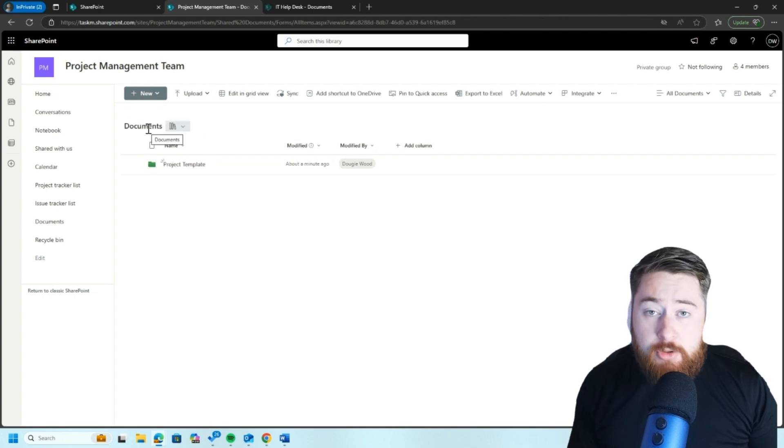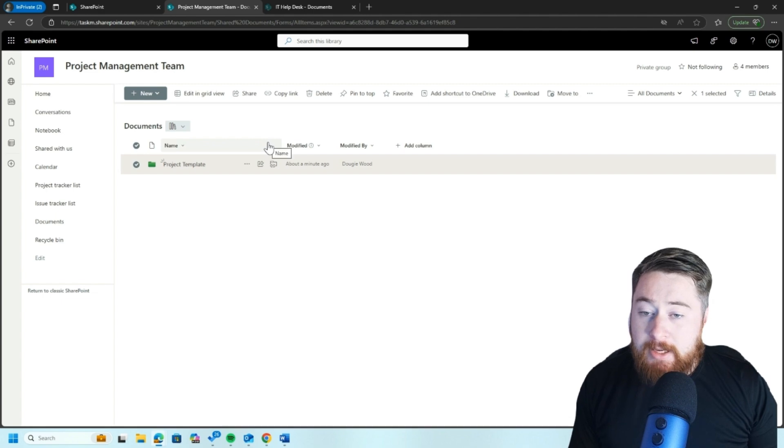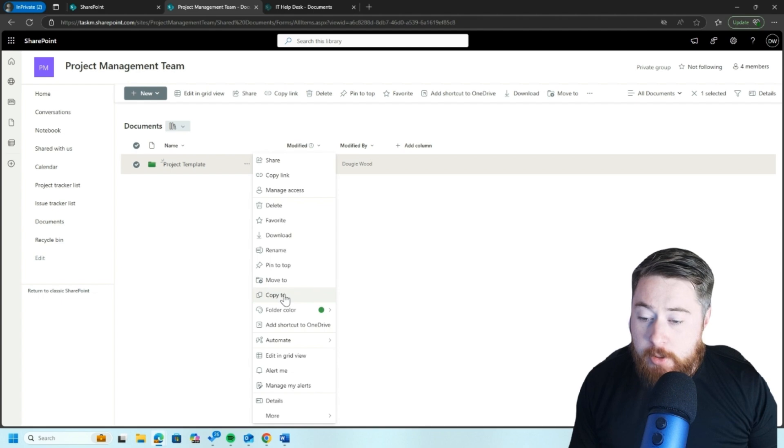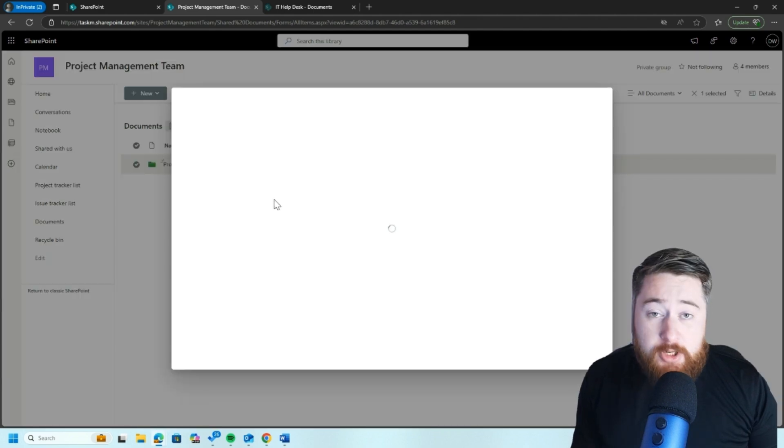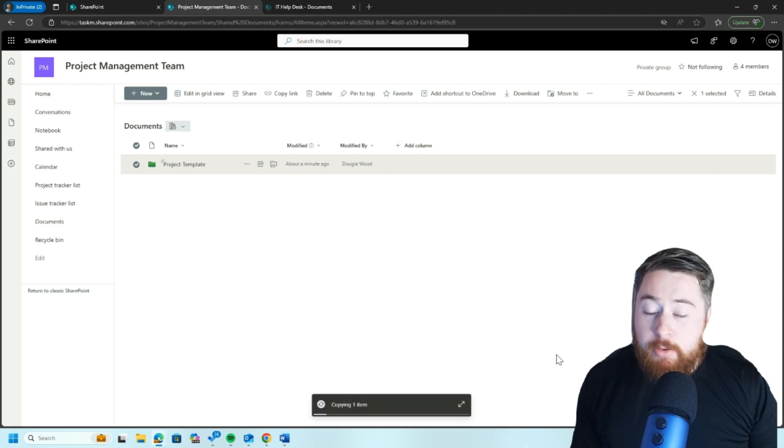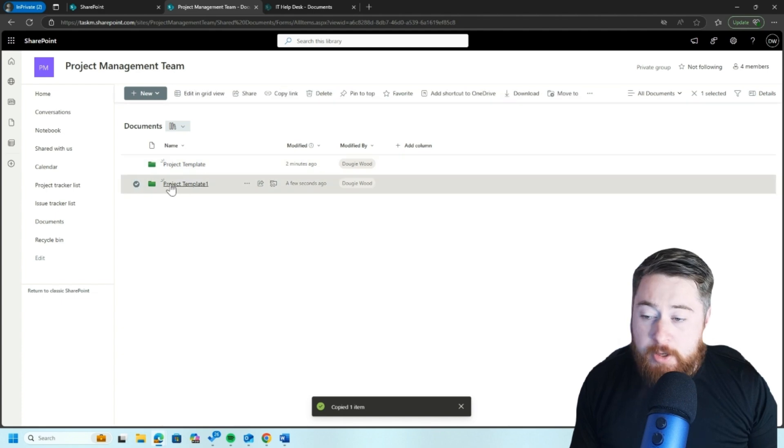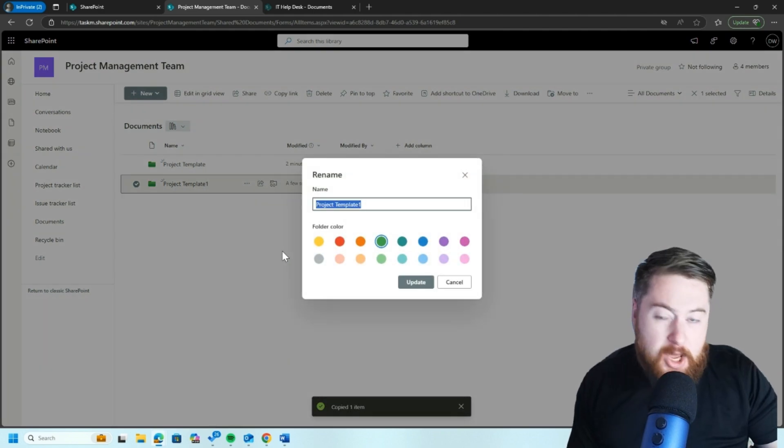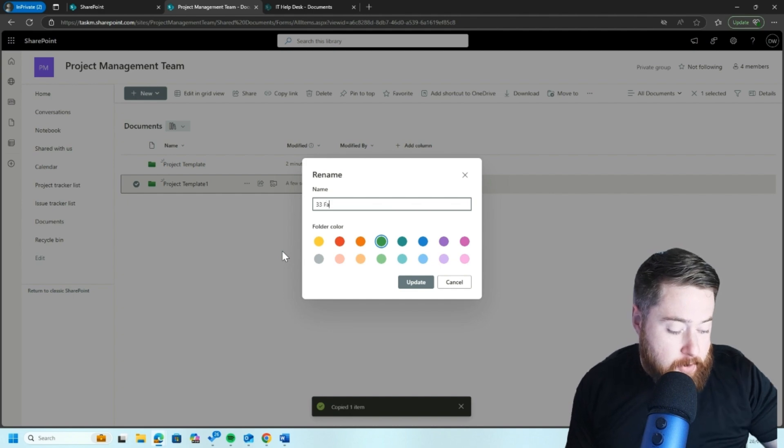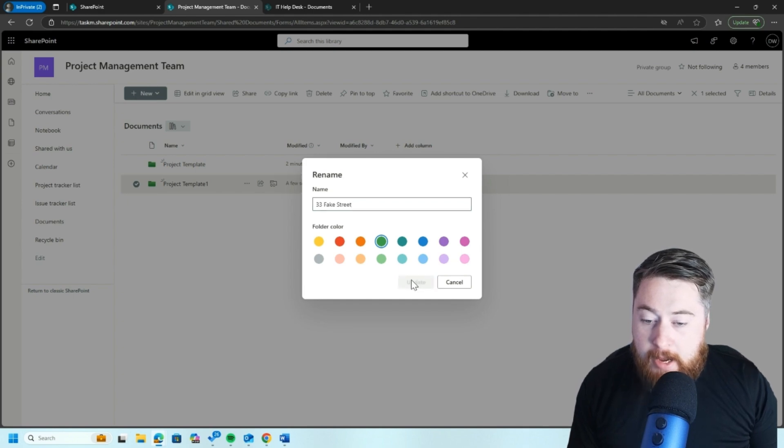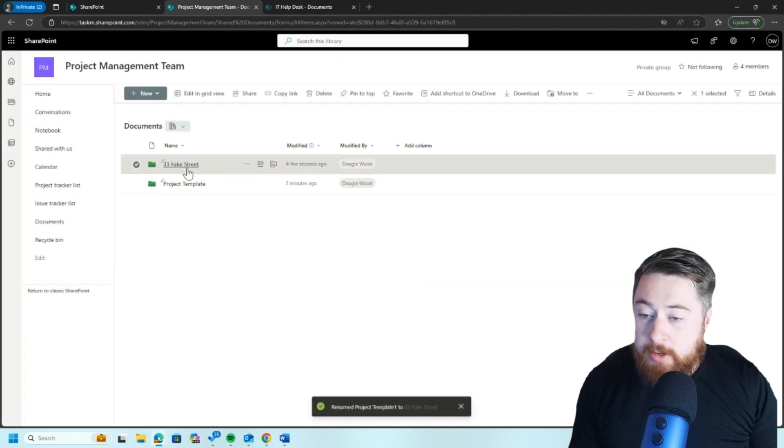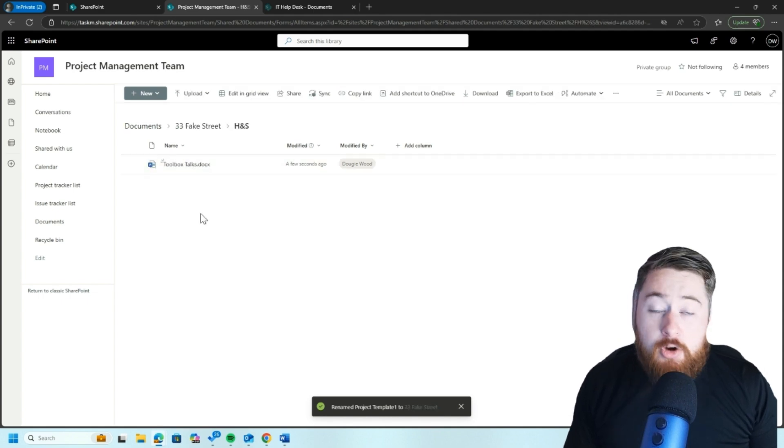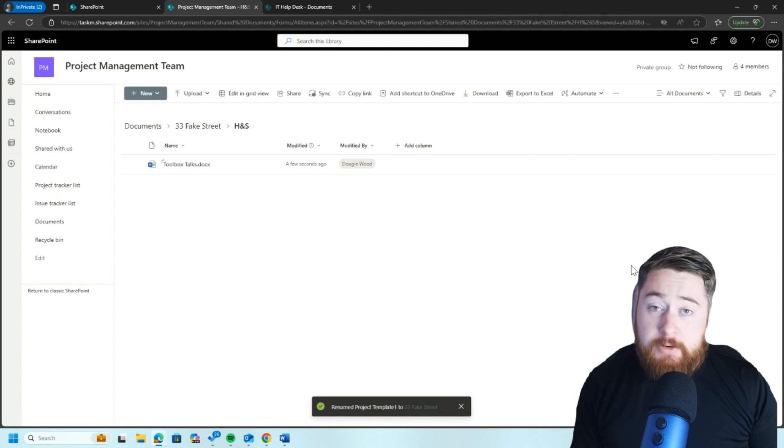If I go back to the top level of my document library, I've now got my folder structure, my folders, and even some documents inside of there. Every time I have a new project that kicks off, all I need to do is select that folder and then click on the three dots and then click on copy to. I'm just going to copy it within its own library, so I'm just going to click on copy here and it will then copy that template. All I then need to do is rename it because it will basically just call it project template one. So maybe click on the three dots, click on rename, call it whatever the project is called. Quite often if it's construction, it'll be address, so it'll be like 33 fake street, something like that. And then click on update. And there we go. If I click into my folder, you'll then see all my folder structures and you'll even see the documents as well that you put in here. So this is a fantastic top tip when it comes to collaborating with your team, making sure you've got an agreed folder structure that can be replicated.